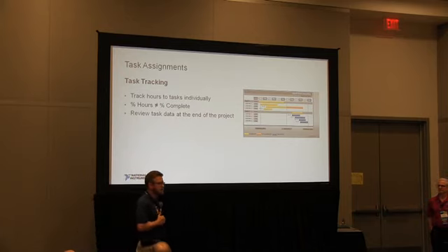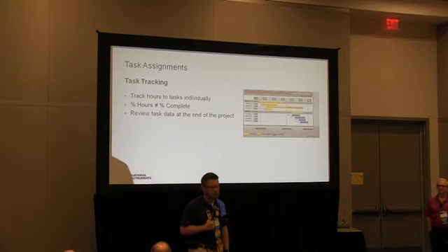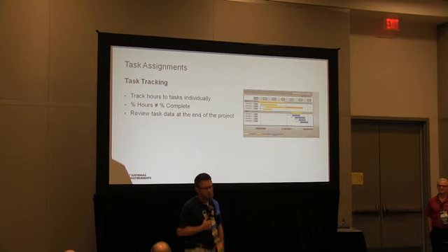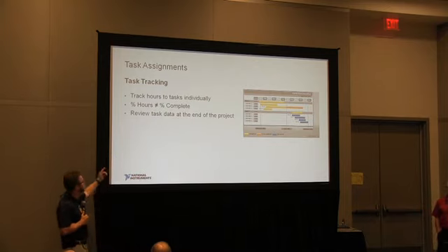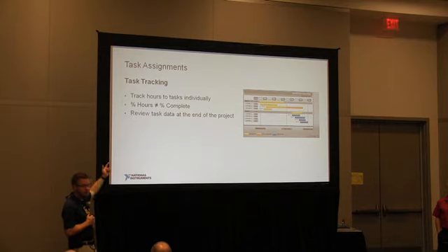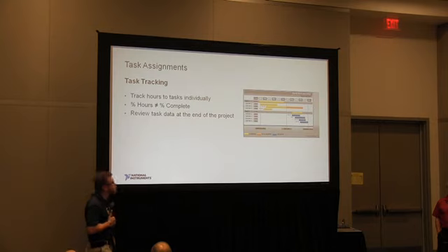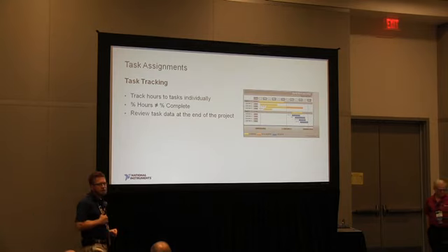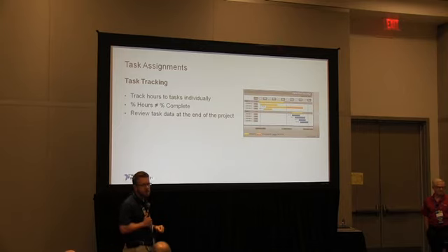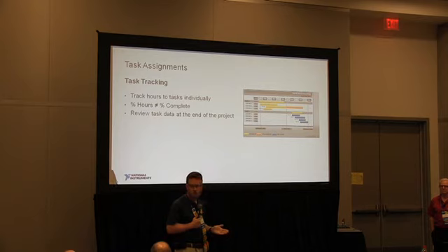And that's when you got to go to your manager or your project manager and you got to say, we're in trouble. The flip side also happens, I've had it before, hey, I'm done and I'm only through half the hours. Now, that's not the typical case, but sometimes it does happen. So I think it's also important that you evaluate those tasks at the end of a project. Okay, so this task we thought was going to take 100 hours. It took 200 hours. Why?